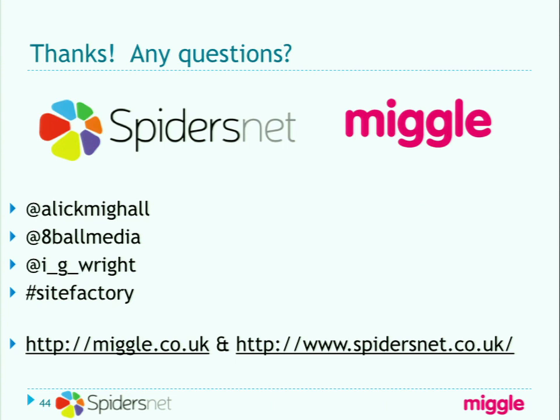So there was a point at which it went from fixed cost to something a little more open ended, and now we just have a rolling support contract where we commit to doing a certain amount of hours. I think we commit to doing 8 hours a week. We also put a day's development in our schedule a week for them to be able to call on if they need it, and again they just prioritise features against that.